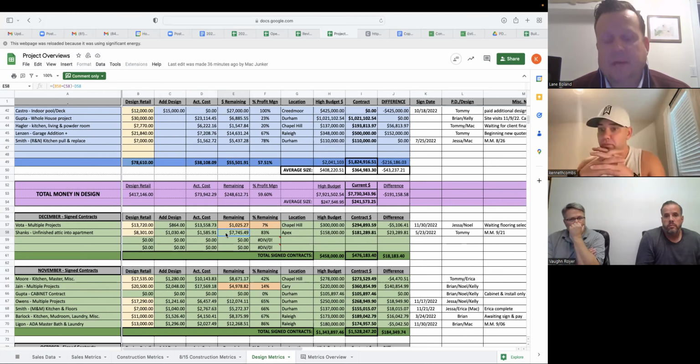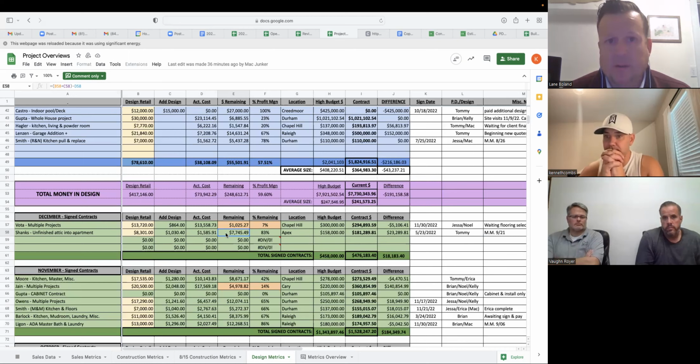Ken, to answer Justin's question too, because our design director is weak as a manager, there's billable hours that we don't charge against the retainer because it was clearly our fault. Correct. And we have a lot of training going on. We have 2 new people, 2 young, directly out of architecture school. So you really have 2 people billing the same job, doing the same task, and that happens a lot right now. So we're not really making a lot of money on design.